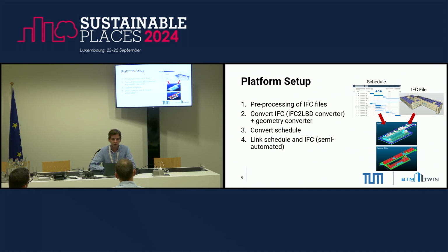Then basically we had to do the same for the schedule. Here it's a bit tricky because there's no existing standard for exchanging schedules. The material we got from the different construction sites was in Finnish, Spanish, and other languages, and structured very differently. Trying to figure out what's going on, and to link this to the IFC file, is a challenge by itself. So we have developed some methodologies that do at least some semi-automated linking, but there are still some manual steps involved because the differences between companies are very, very large.